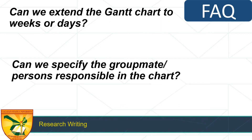Now for frequently asked questions about preparing your Gantt chart. Number one: can we extend the Gantt chart to weeks or days? Yes. In my case, when a funding agency asks for the Gantt chart, I write it in months. But for my own use, I write it in weeks so I can strictly check if I'm on schedule. For days, I don't really recommend it because we don't control others' schedules, and you'll have to erase and rewrite frequently. So I suggest weeks or months.